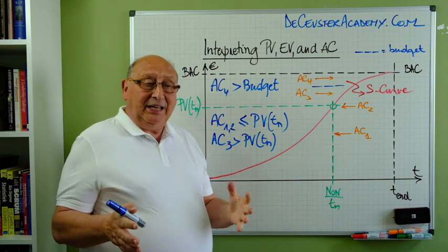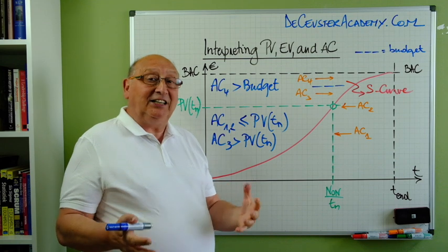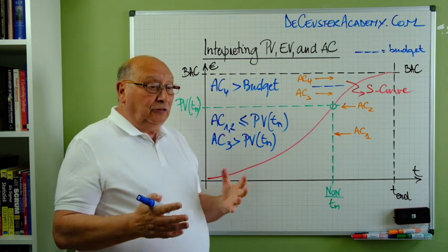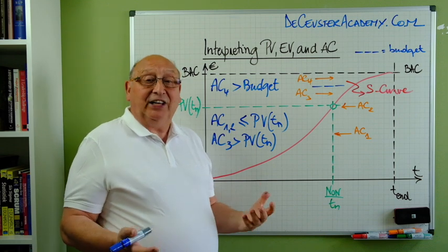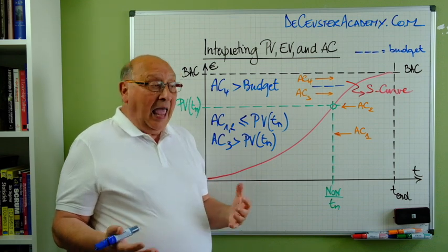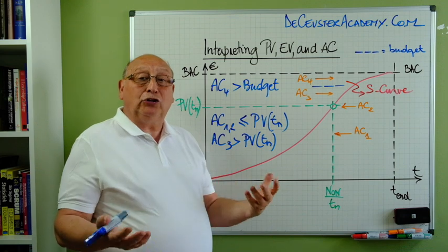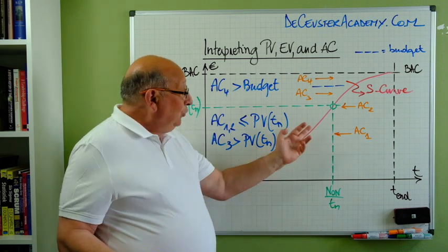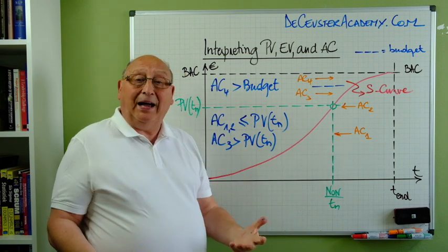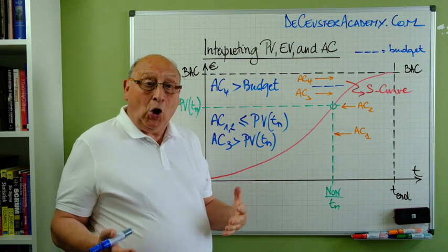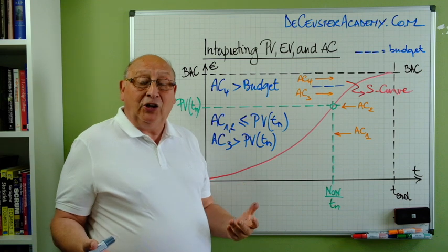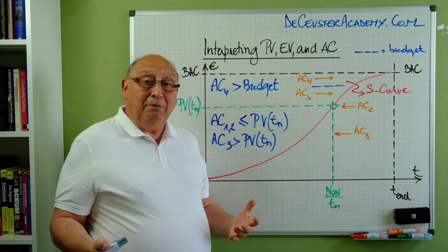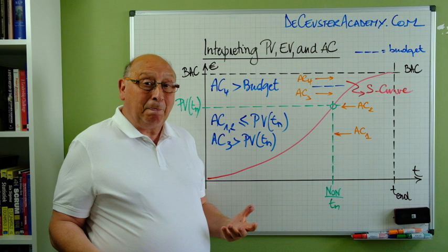When we create the S-curve, what do we do? In the planning, we create activities, and each activity shows certain deliverables being created, work being done, and for that work, we have a cost estimate. And those two pieces of information are combined in the S-curve. We have the expression of the deliverables produced over time in monetary value.